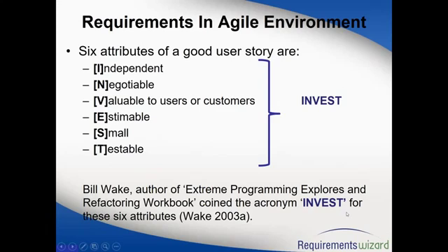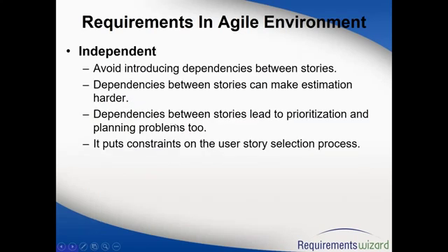So this is basically an acronym, INVEST, which is nothing but independent, negotiable. It should be valuable to the customers. You should be able to estimate it. It should be small, and you should be able to test it. That's what it is. And that's how the INVEST acronym was formed. So the first one is independent.